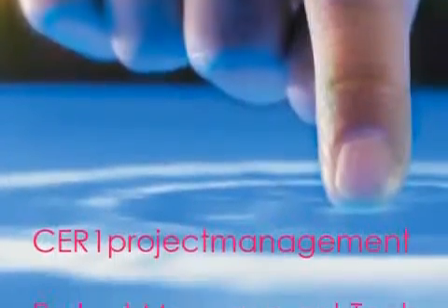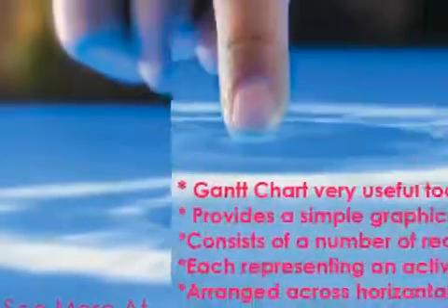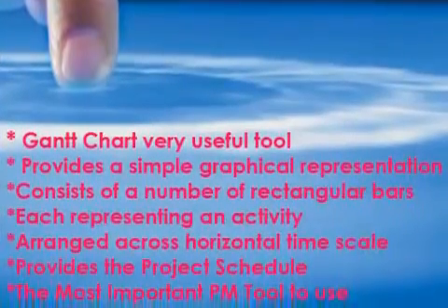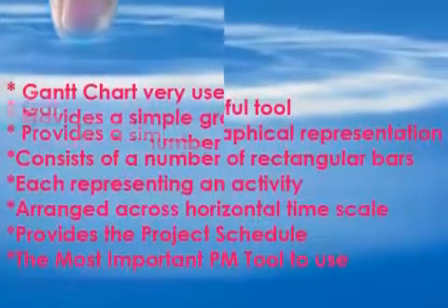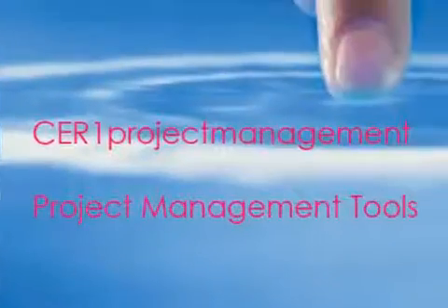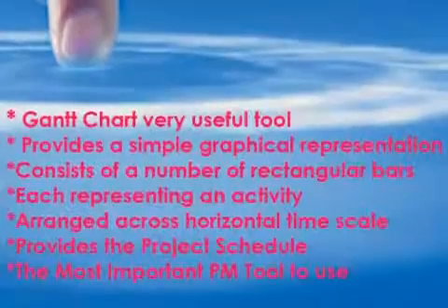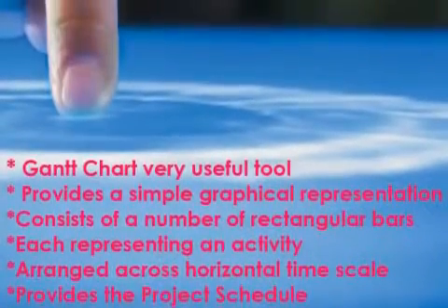It is one of the most convenient, most used, and easy to grasp depictions of project activities that I have encountered during my career. The chart is formatted as a two-dimensional representation of the project schedule with activities shown in the rows and time shown across the horizontal axis. It can be used during planning, for resource scheduling, and for status reporting.